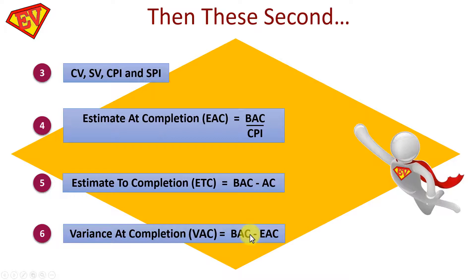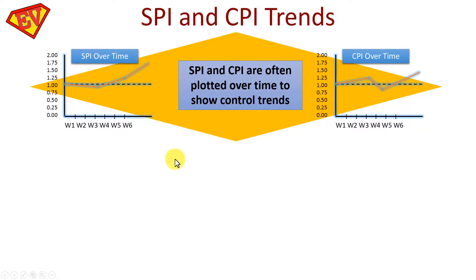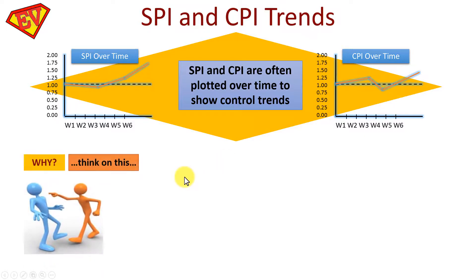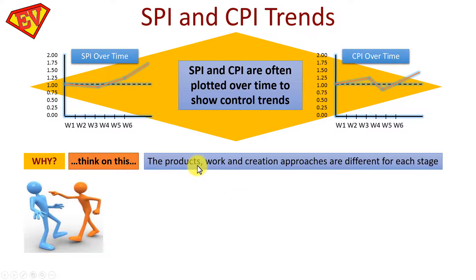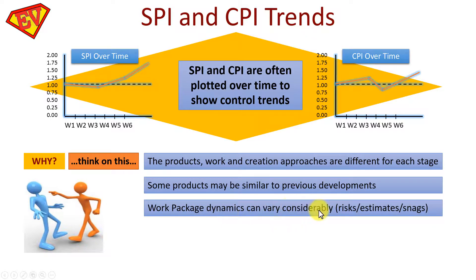Step 6: Variance at Completion (VAC) = BAC − EAC. When it comes to SPI and CPI, you often need to understand trends plotted over time. CPI and SPI vary throughout a project because: the products and approaches differ by stage; some products may be similar to previous work, making teams more efficient; work package dynamics vary with risk, estimate certainty, and snags.